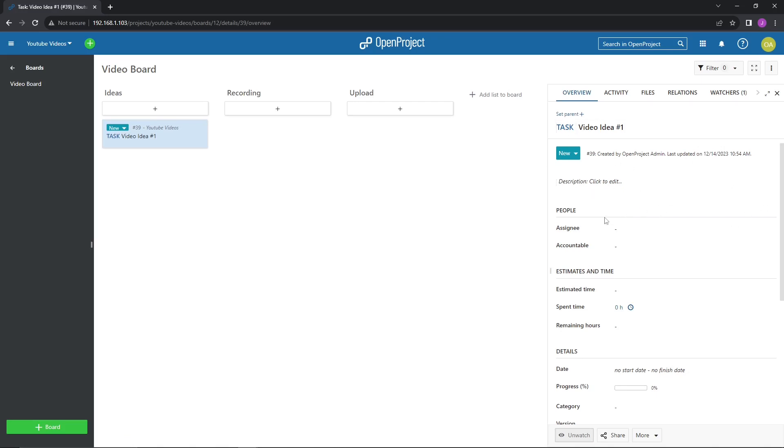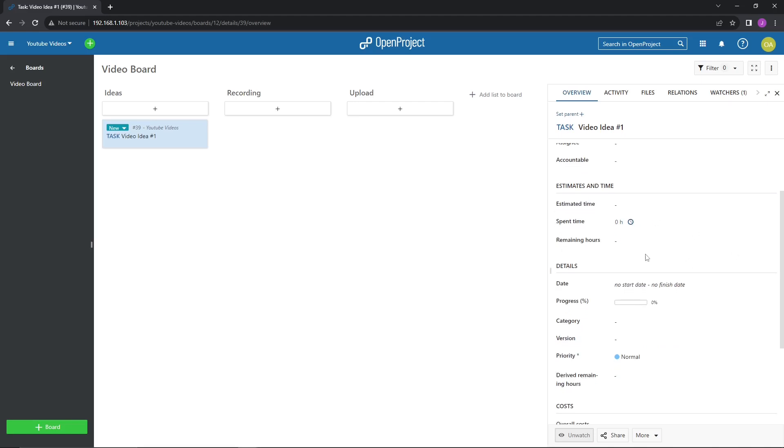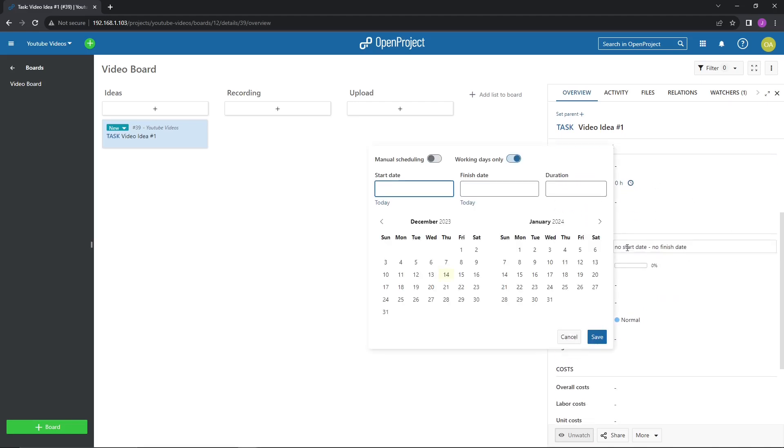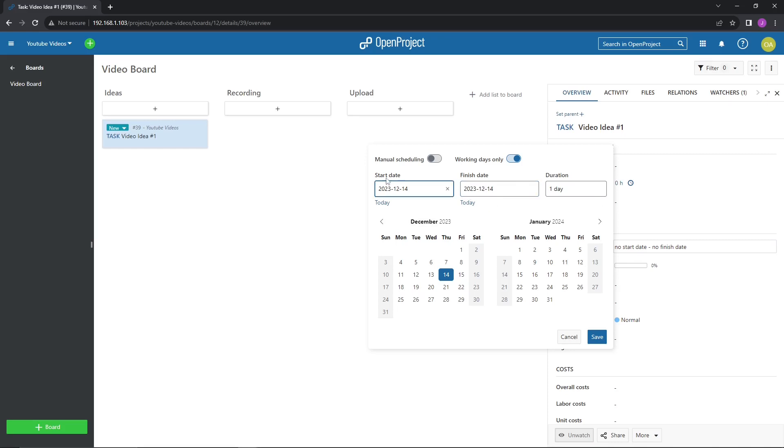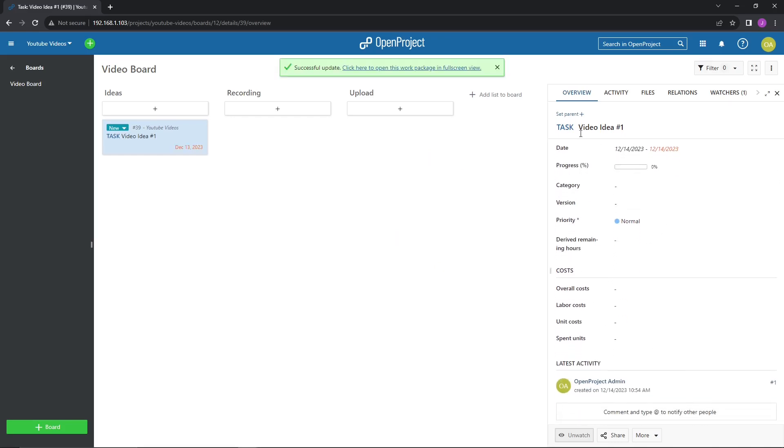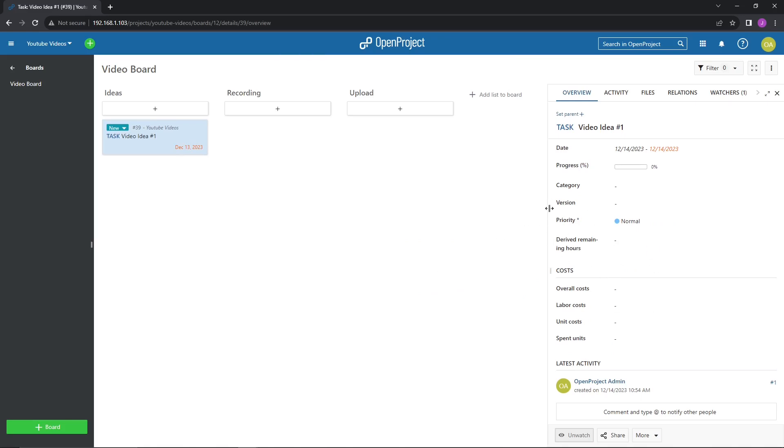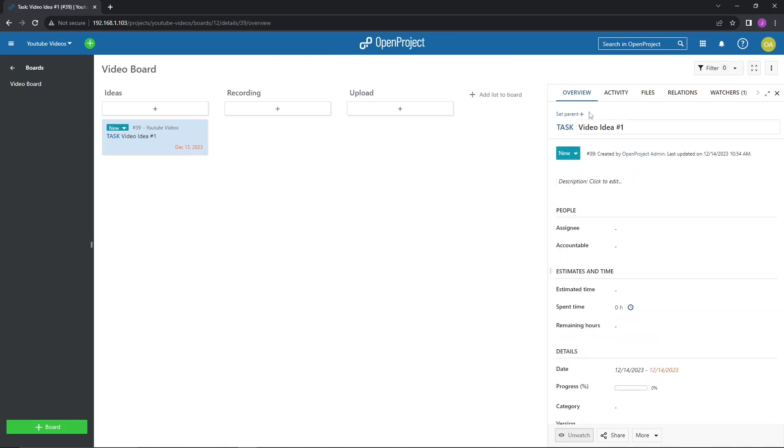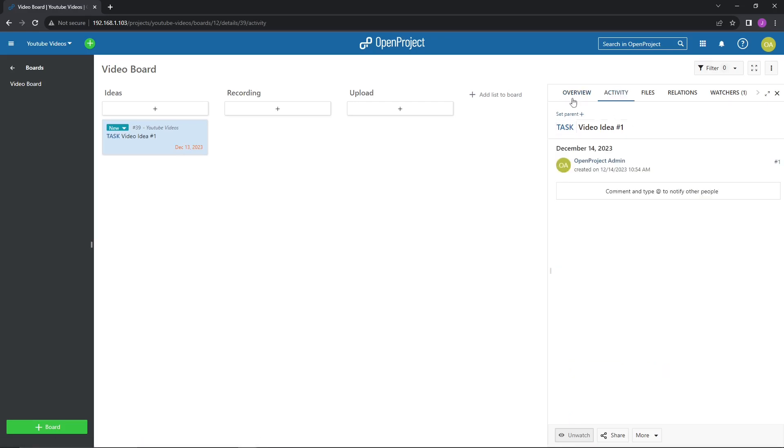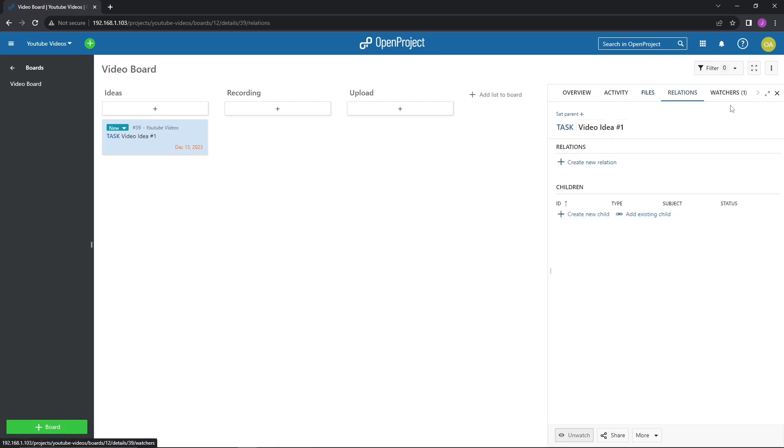And you can go ahead and add a description. You can assign it to people, time. One of the things that I want to do is track the start dates and finish dates as to when I want to complete these various projects or tasks within that project. So we're just going to add a one day duration and this video should be completed today, December 14th, 2023. We'll save that out. Just some more options that we have available to us. And I believe we have the ability to even add custom fields. So if we needed to add information that is not available to us from the default activity, you could see exactly what is going on and what people are doing within that task. We could attach files, which is nice. And then we have relations and then watchers. In this case, it's just going to be me.